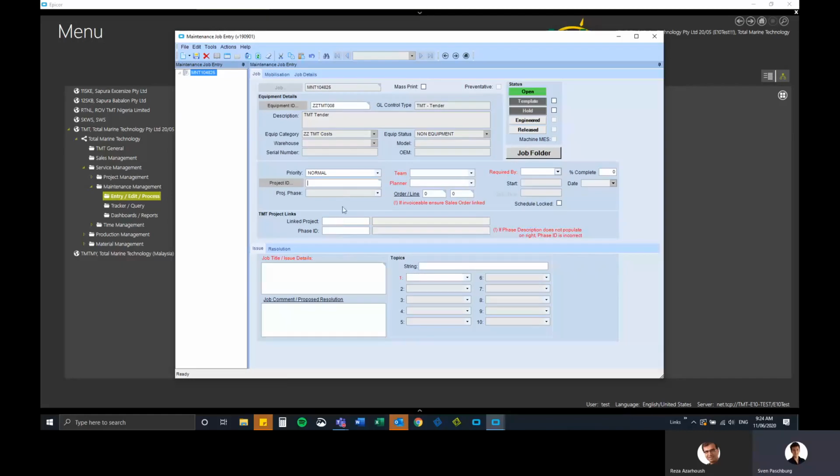I ask that if you're creating a job and it's to be linked to a project, please send that to our project planners. So that's Andrew Welsh and that's Samuel Johns. They know how to link up a job to a project properly. And they're also responsible for maintaining the work breakdown structure. So if you're needing a new job created, just refer to them. They will ensure that it's linked up properly so that you as a project manager can see those job costs properly in your project transaction spreadsheet.